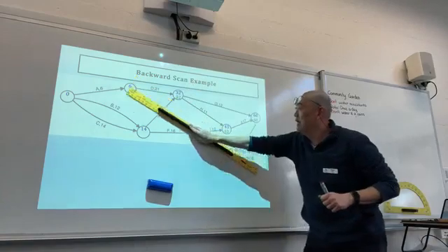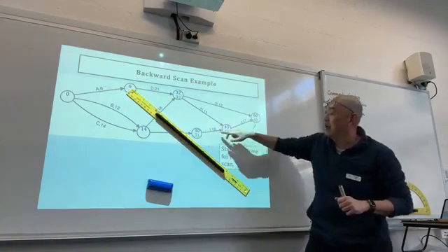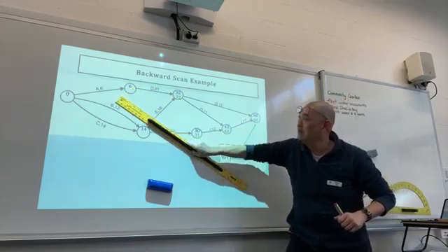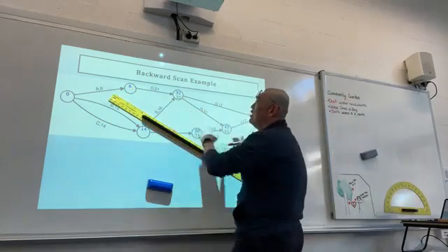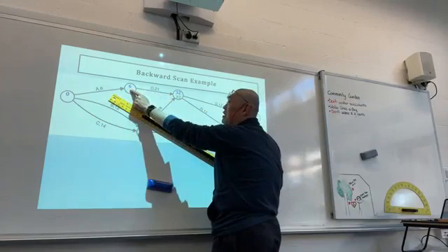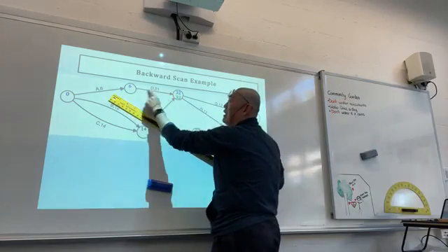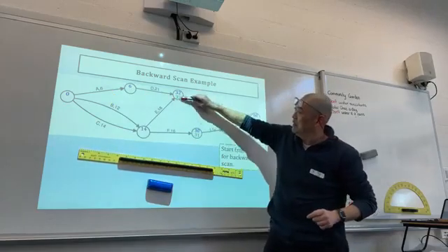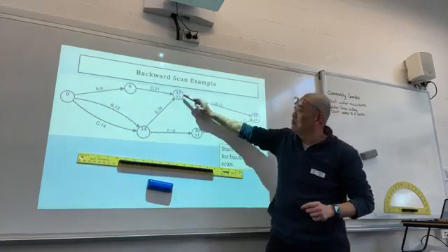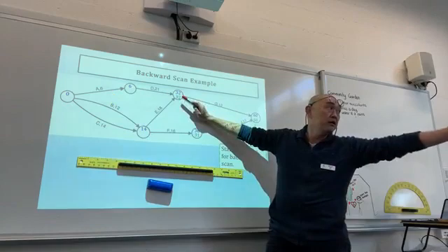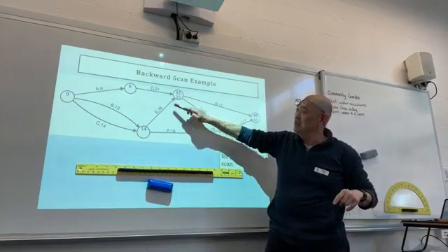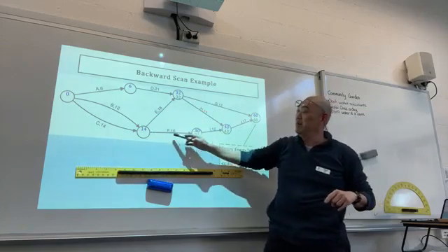And here is 31 because there's only one arc going in. Yeah? All right, let's continue. Here, of course, you know that 32 minus 21, that's only one arc going in, you can work that straight away. However, you need to think about here and here. What do you do? All right, 32 minus 18 and 31 minus 16.